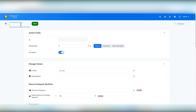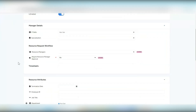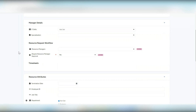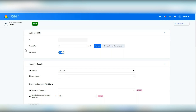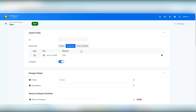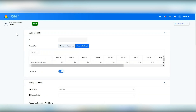I'm going to go ahead and create a new team resource. You still have access to all of your resource attributes; however, this cannot be a user within Tempest — there's no login information, no global role, and no timesheet user abilities. However, members of the team can still submit time to the team on their timesheets. Something unique about team resources is the default rate — you can enter a manual rate per hour, create an advanced rate, or use the new auto-calculated option, which takes the default rates of all team members and calculates the rate based on that information. This is time-based, so you can view it by month, day, week, or quarter.